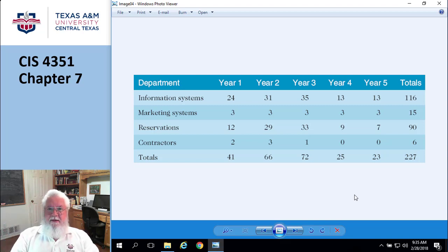Great, top down. Bottom up is I really don't know how much it's going to cost, so let's actually start with the building blocks. I'm going to need 4 of those and 6 of those and 8 of those, and build it up. So when you sum up all of the sub costs, you come up with the total cost estimate. So top down is we've done this, I kind of sort of know. Bottom up is let me just go ahead and calculate all the costs individually, and we'll sum them together.